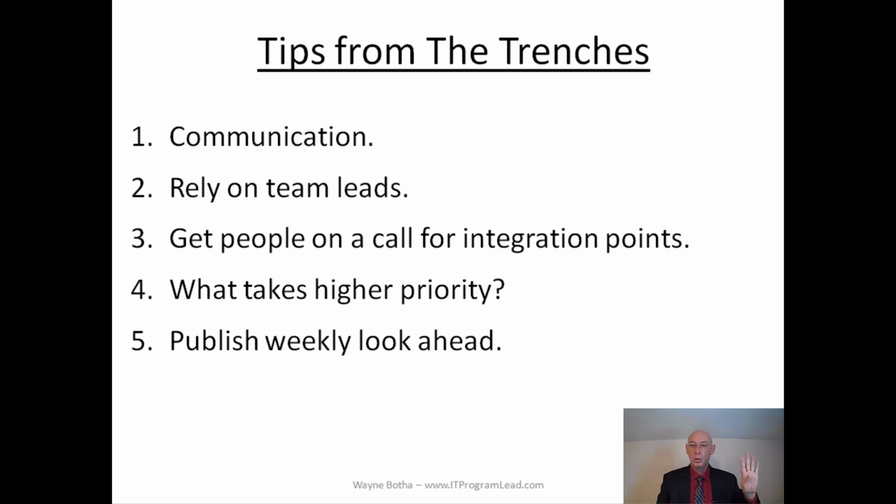So tip number 4, what takes higher priority? When you've got a program that is running partially waterfall and partially agile, I found that the waterfall portion usually takes priority. Many companies are running mainframes that have a certain scheduled downtime. For example, the release must be done on the third Sunday of the month because that's when the scheduled downtime is. If that is the case, then your Agile teams need to provide the appropriate deliverables on time for integrated testing for the mainframe systems to have the right deadlines.